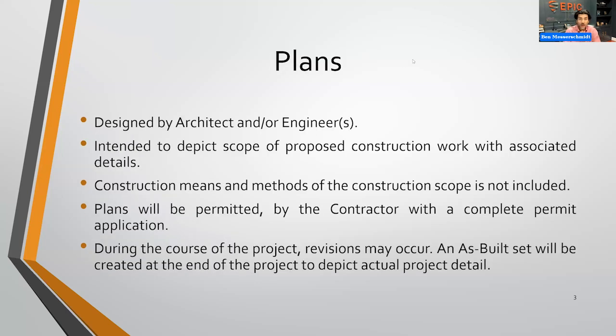Okay, so plans. This is going to be the first step of the actual construction process. Now, this is really step two, depending on what sort of project you're dealing with. Step one is really going to be doing some sort of evaluation or establishing the actual scope. So an example would be taking a facade restoration project on a tower, let's say, and the engineer or designer is asked to forecast some repair quantities. So you know generally how much this may be. What are you talking about? A $50,000 project or a $500,000 project or potentially even more.